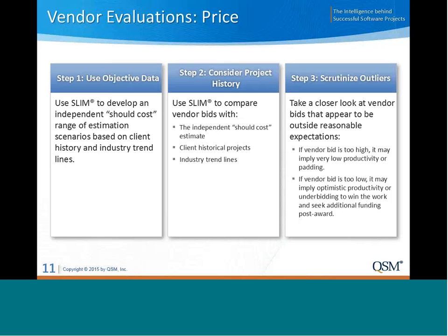Then the second step, once the bids come in, is to use the SLIM tool, which I'll explain on the next couple of slides, to compare the vendor bids with not only the independent should-cost estimate, but also with other historical projects completed in the client environment, as well as industry trend lines.